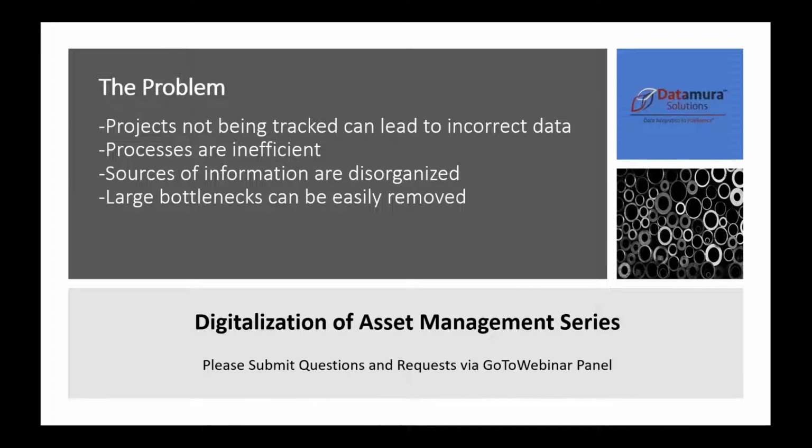It is extremely important, for example, that if a piece of equipment needs to be changed out for a different one, say a tank, we have to update it to make sure it has the correct data assigned to it. Examples of this data could be the capacity of the tank, the correct electrical information, or even the correct service information. If we don't do that, the next time we have a major change related to that specific asset, we aren't going to have the correct information to base our design off of. You'd think this would be a simple process. However, things like these get missed all of the time.